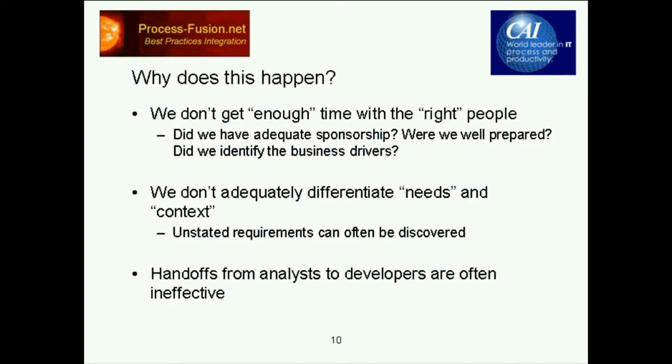And those kinds of things, those de-scoped requirements, tend to consume between 10 and 15% of total software resources. So in other words, that's a pure form of waste. We've invested effort, but we didn't deliver anything of value, yet we consumed a lot of resource working on things that we really never delivered.